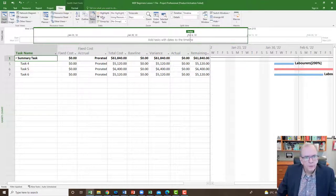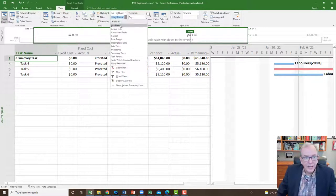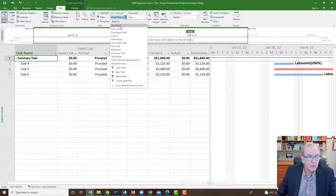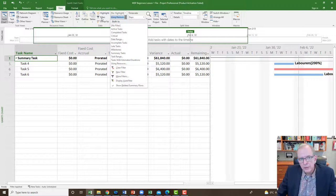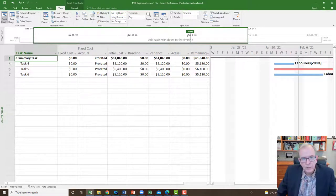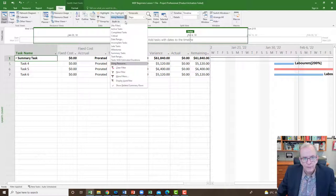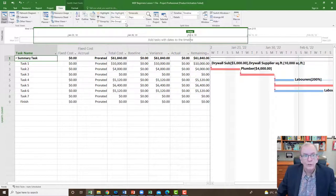It tells you that it's filtered — 'Using Resource' — and shows no highlight, no group. To get everything back, just set Filter to 'No Filter' and you're back to normal.